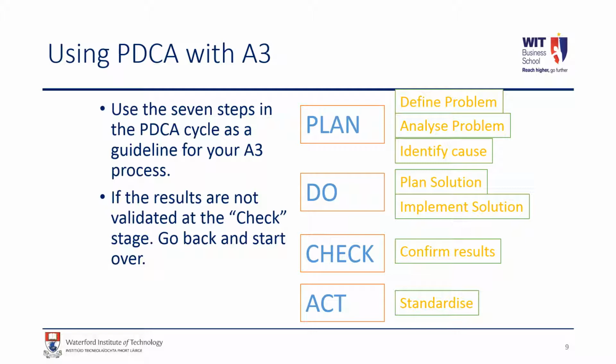In the check phase, then we're confirming whether or not the solution has delivered the desired results, and we're confirming those results. And then in the act stage, we're looking at standardizing the countermeasures that have been suggested in the A3. So if you like, standardizing the procedures around the solutions that we've implemented.